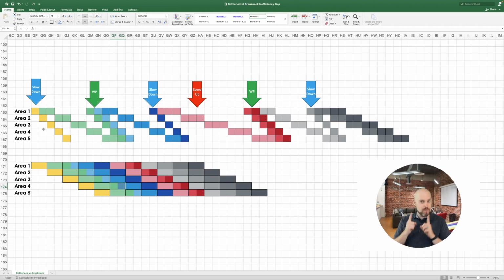But let's talk about breaknecks. Now with the breaknecks, our fast trades, we can slow down production by having fewer resources or fewer crews or fewer builders or fewer workers, right? But I think most of the time, between 50 and 60%, that works. But for the rest of it, what do we do? I have a couple options, but I want to tell you a story about one that I did with a team recently.